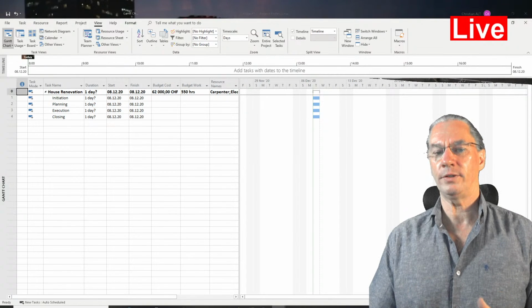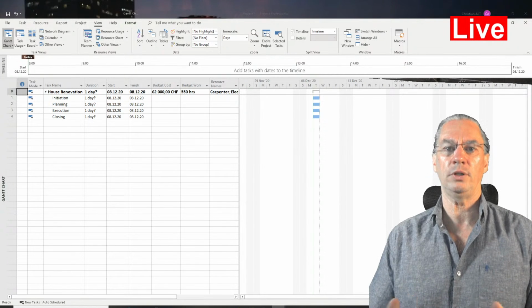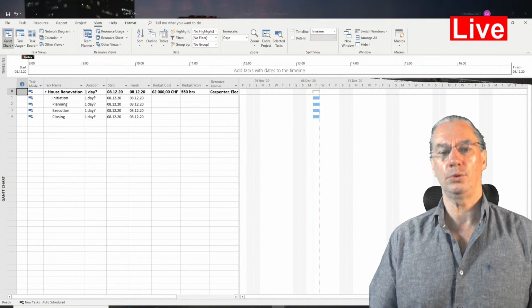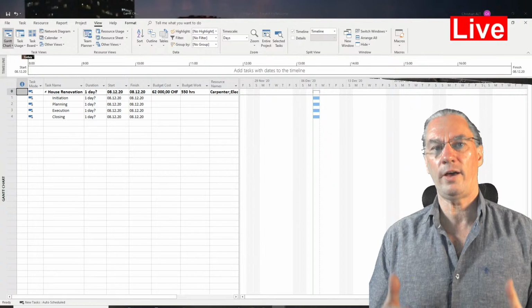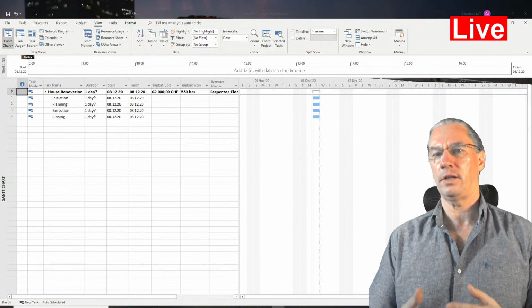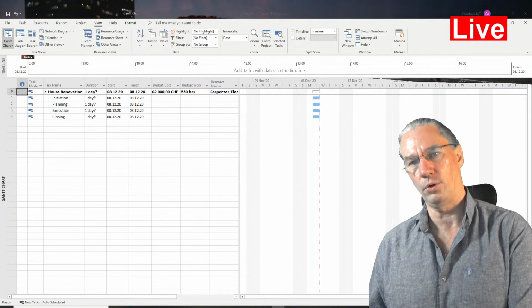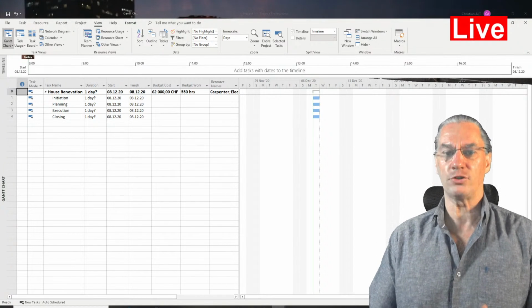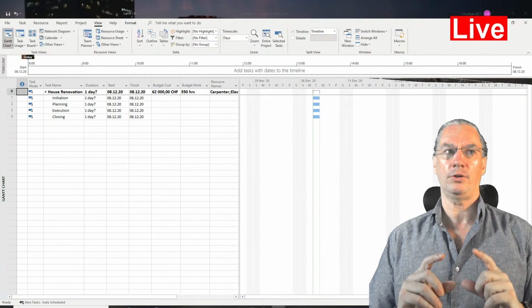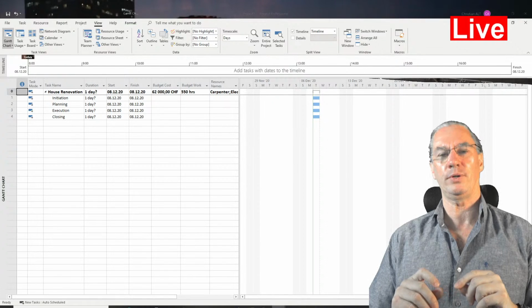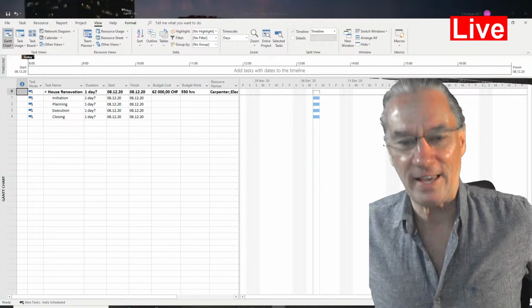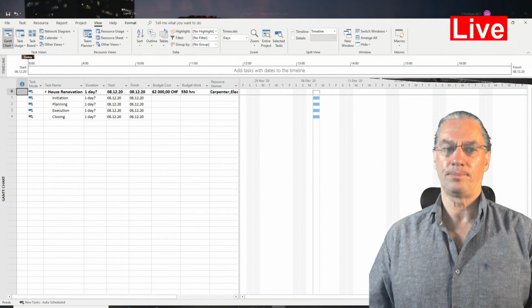It's now you enter into the phase of scheduling activities. So yes, you can adapt, you can make it, but you have to do it. MS Project, for the scheduling, is not going to look back at those budget resources. And to be really precise, your question made me think that there is one thing I haven't answered. It's not that I haven't answered, but I haven't said.